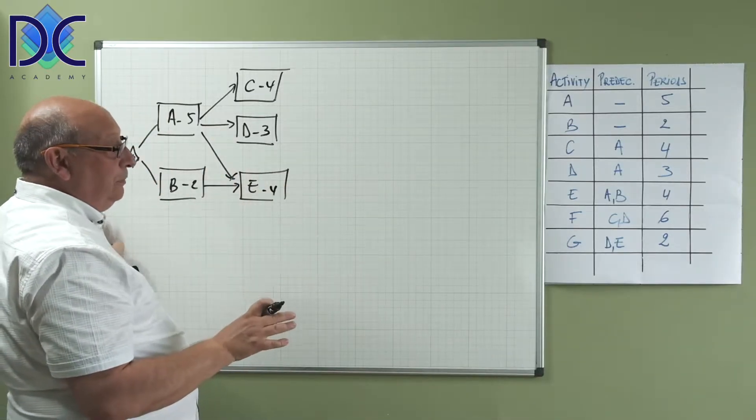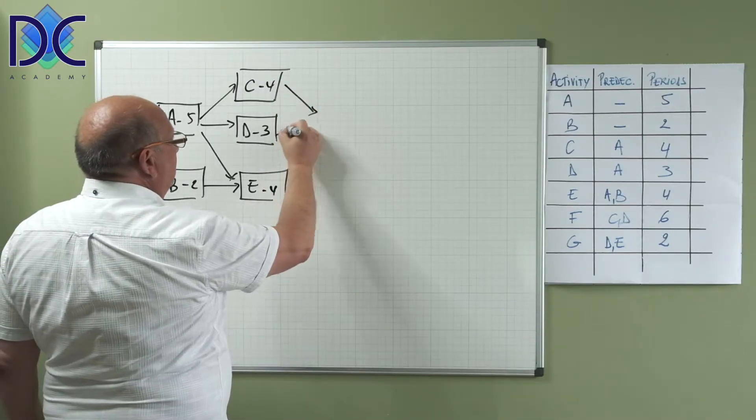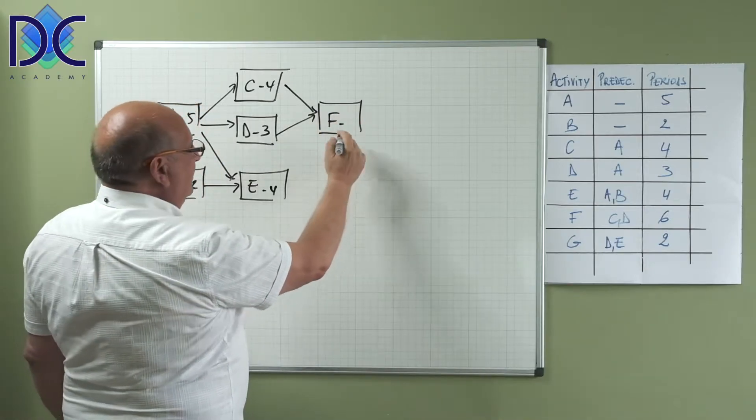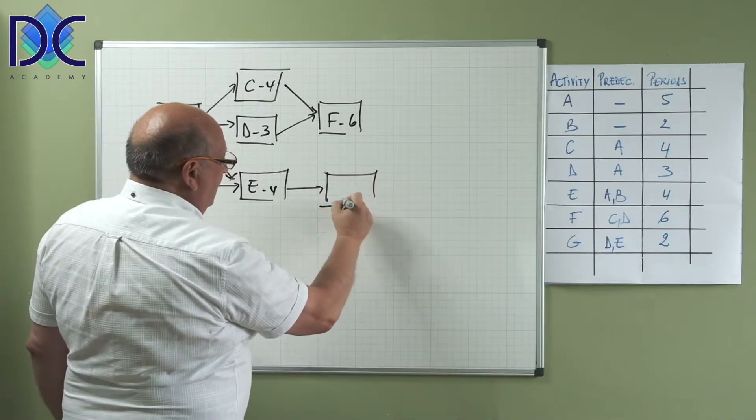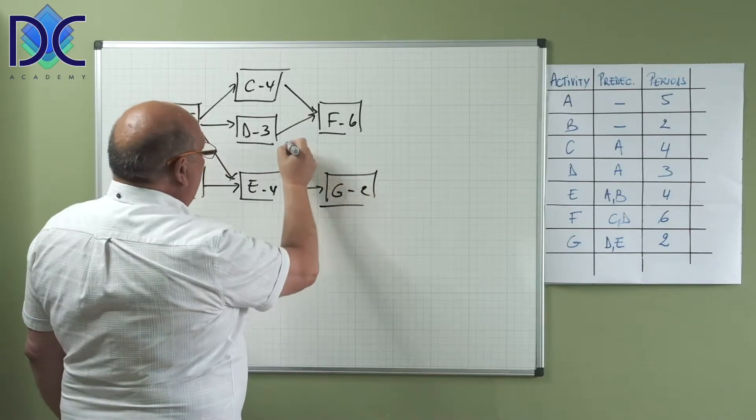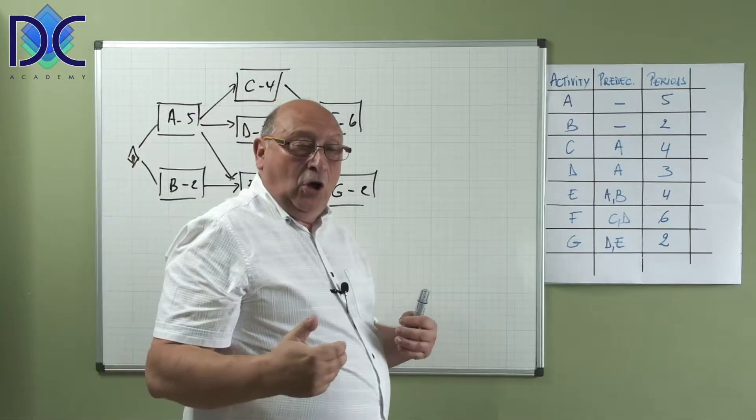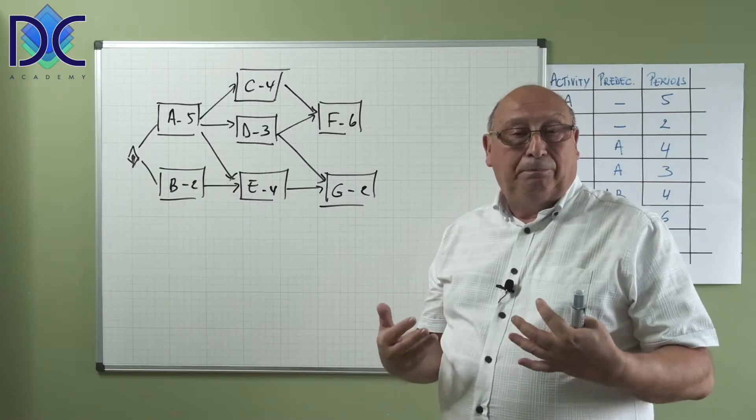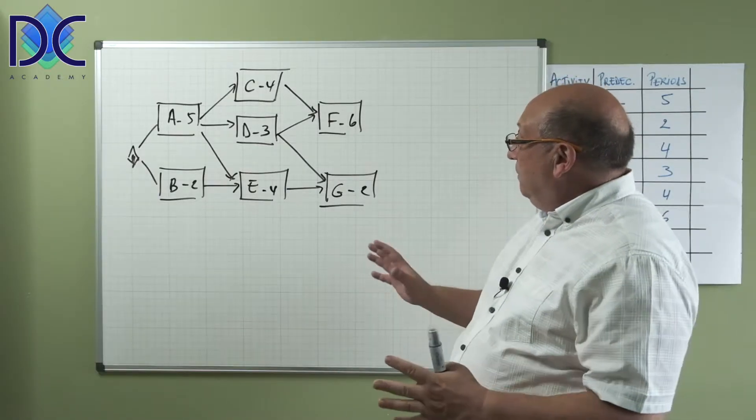F has C and D as predecessors with the duration of 6, and G also has D and E as predecessors. So our schedule is a little bit more complex. We have a few more arrows, a few more precedences than in the previous diagram, but basically the principle stays the same.